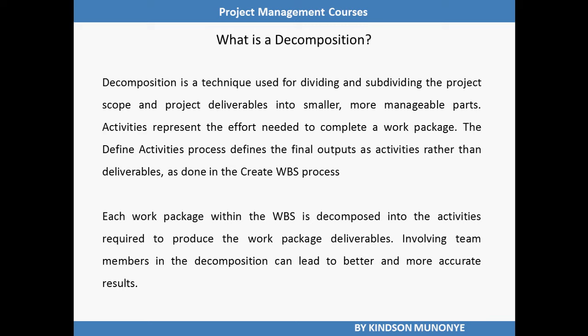Each work package within the WBS is decomposed into activities required to produce the work package deliverables. And involving team members in the decomposition can lead to better, more accurate results.